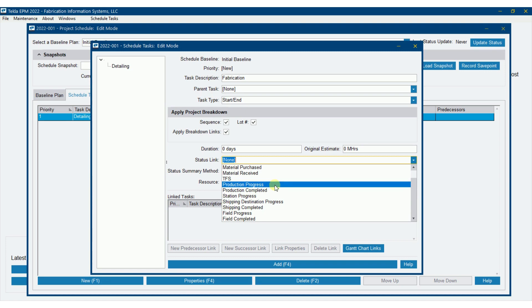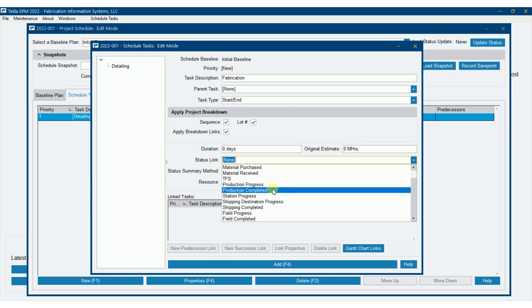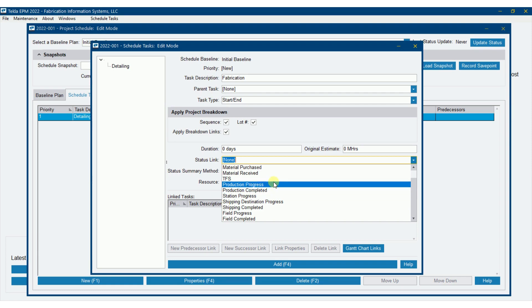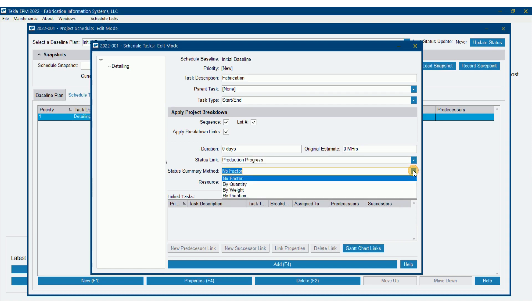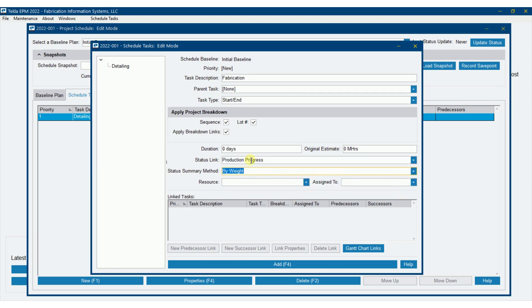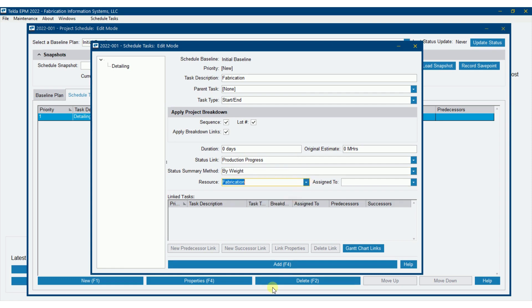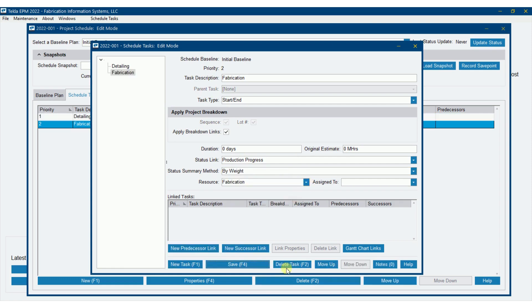Production progress, think of it this way. If I had one piece on my project and I had four stations that it's going to go through, production completed would be if I've completed two of the four stations, I'm still 0% complete. However, production progress, if I've completed two of the four, says I'm 50% complete. I prefer production progress. So if I've done some work, it'll tell me what work I've done and what percent complete I am. So status summary method, I'm going to do this one by weight. So I'm wanting it to calculate my production progress, my percent complete by production progress via weight. And I'm going to apply it to fabrication and I'm going to add.